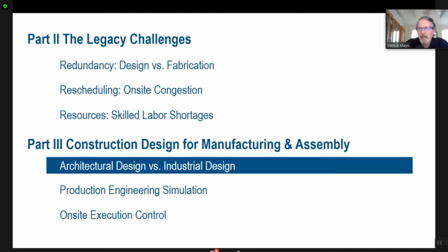Sure. This is not about software at all or technology at all. This is a business issue. And it starts with contracts. You have a best chance of reducing redundancy if you're in a design-build relationship, as one example, in which you're working for the general contractor, and therefore you have the protection that their insurance provides as opposed to the normal architectural malpractice sort of insurance. This means that potentially you can look at delivery issues and fabrication issues in conjunction with a contractor. That's one form of contract.